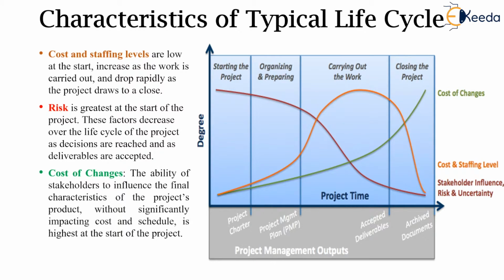While the project is at a peak, you can have huge number of engineers, supervisors, workers working simultaneously at the site. Once the peak is gone and the project nears completion, there is a rapid drop. There can be series of staff getting transferred from the project, etc., and only a handful of commercial planning and site staff will be retained.